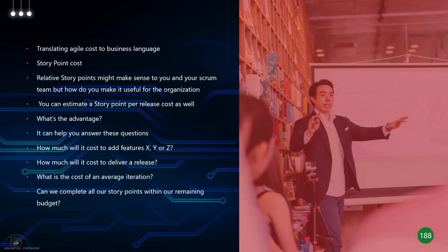I don't want to go into much detail about this. The concepts are very similar to what we use in regular project management, right? All we're doing is looking at different user stories, breaking them down, and attaching a cost to that. Let's say your feature is a home screen, right? Based on the number of stories that you're estimating and the stories you're completing, you can actually assign a value to it, and you can say, hey, one story point is going to be $5.